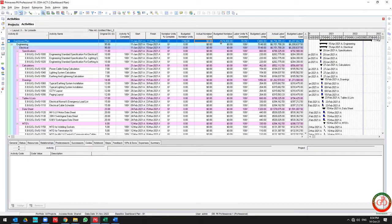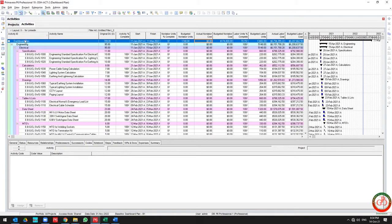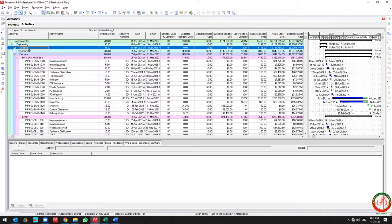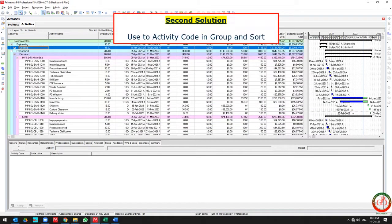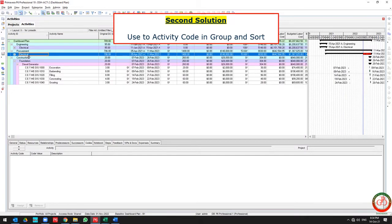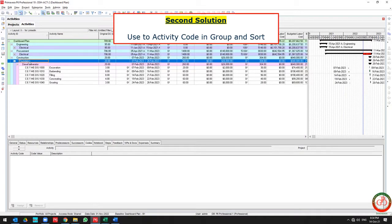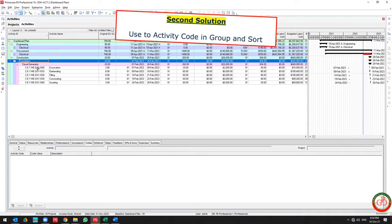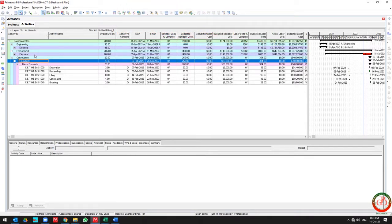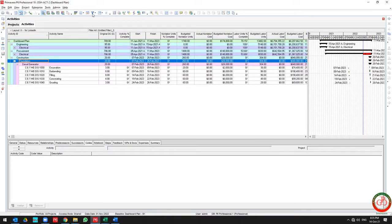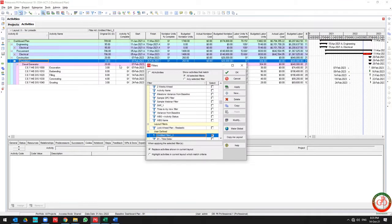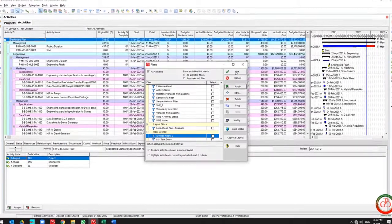But maybe you need to know the progress for each discipline in the project. When I use filtration, only the tasks related to this discipline are filtered and other tasks are not showing. So you should remove the filtration.